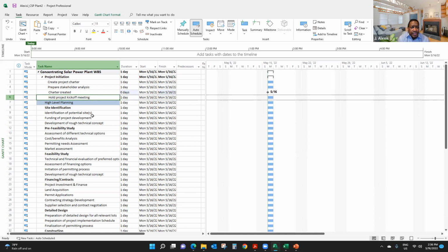One important thing that I didn't do in this plan is that I didn't enter a start date yet. This is one of the first things you do when you start a project plan. You need to know when the project will start because everything else will be based on the start date of the project.